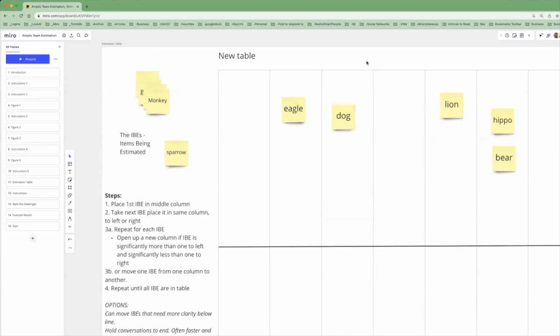See, so I put them basically where this means this is significantly smaller than this, which is significantly smaller than this. We're not worrying about the sizing yet. Worrying about the number slows you down. But notice how this is relative to each other, not relative to some preordained number that we use. So it actually works a lot better when you do this.